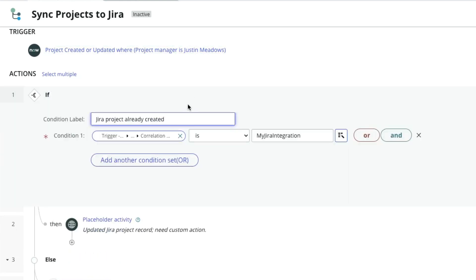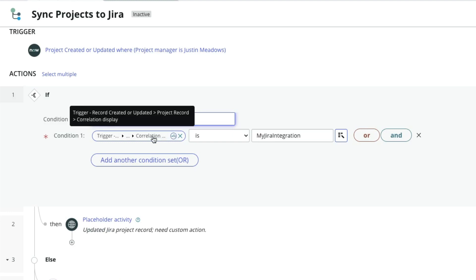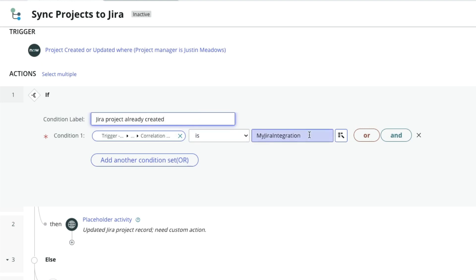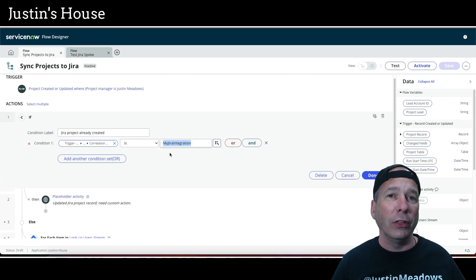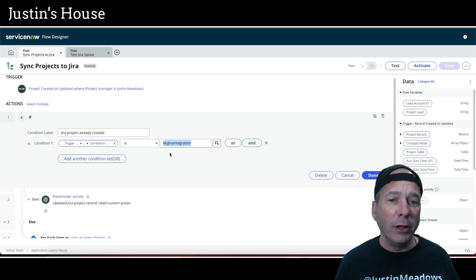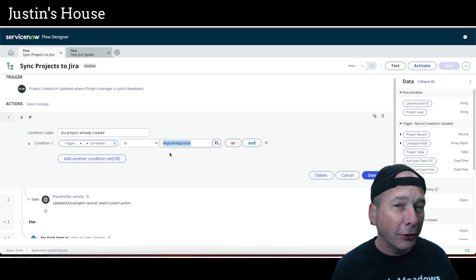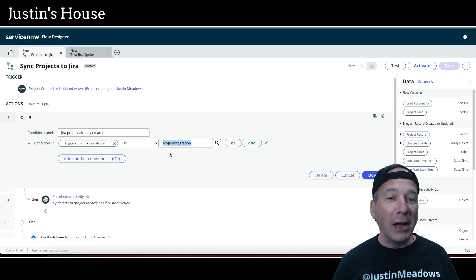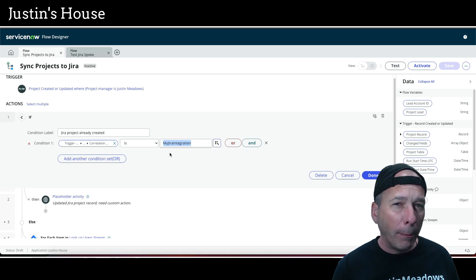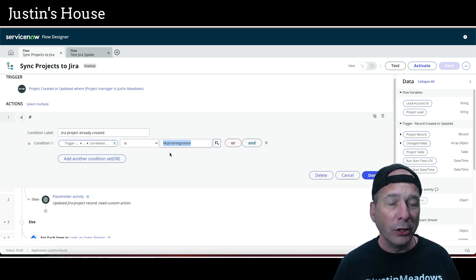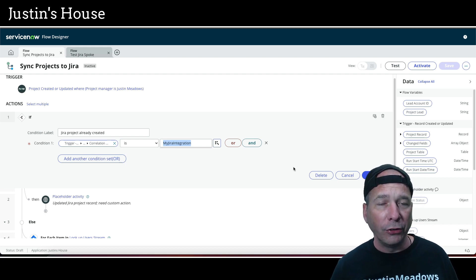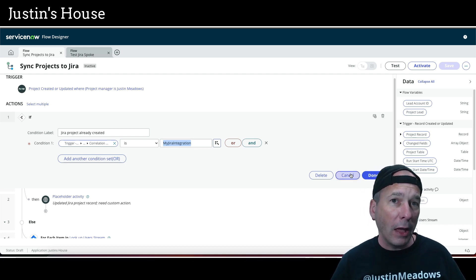When we create a JIRA project, we're going to update the project record in ServiceNow's correlation display to have this string: 'my JIRA integration.' I just picked this — it could have been 'my cool JIRA integration,' 'my awesome JIRA integration,' 'my horrible JIRA integration' — I just chose 'my JIRA integration.' The important piece is to use the same string consistently, because we're going to use this in a couple of places to determine what to do. If that exists, it means we've already created the project in JIRA.